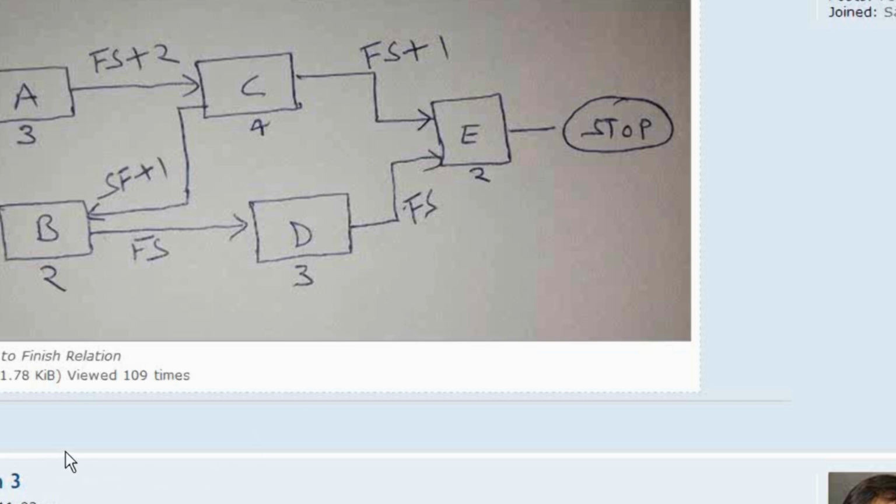And Venkat posted a query as well, about the critical path. A lot of the time we become too habitual of following finish to start relationship without lead and lag. So we end up thinking that if there are 3 activities and we sum up the duration of these 3 activities, we would be able to identify the critical path. The answer is no. Don't rely just on the duration, but also look at the relationship.